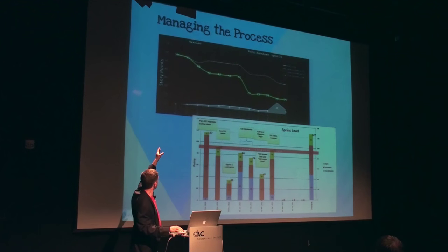So that's where this 59 comes in on the upper left. And then we tracked throughout the 2 weeks how much work did we actually get done. And we were reporting that. We have tools that allow management to see that at any point in time, how much work is being done throughout that two-week period of time. And then every 4 weeks, we do a demo, as Stacy mentioned, where we're showing what did we get done and get the business buy-in.